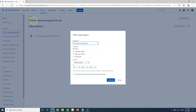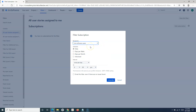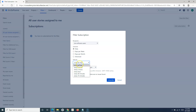To add a subscription, click Add Subscription. You can set it as a personal subscription — only you will be notified — or set it for a group of users, such as all members of Jira Software Users. For example, you can notify that group daily about certain types of issues raised on a daily basis. You can schedule the subscription interval — once per day, every three hours — and set a specific time, such as 6 PM.